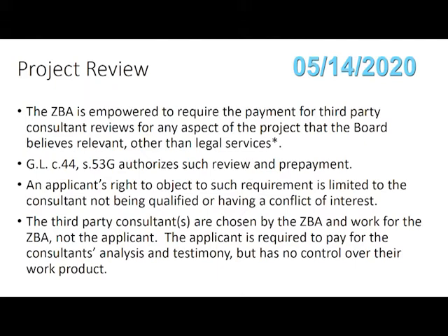John, this is Melissa D'Amato. Can I ask another question? Of course. Is there a limit on the amount of cost with hiring these consultants or these, I don't know, what do you call them, experts? Is there a limit? Great question. On the price? So the short answer is no, there's no limit, but remember the project uneconomic test. Every time you require me to pay for a consultant, $10,000 for a hydrologist, $15,000 for a civil engineer, $30,000 for a land planner, I am going to use that against you on the economics. So no, there is no limit, but just be mindful that it's not a blank check.